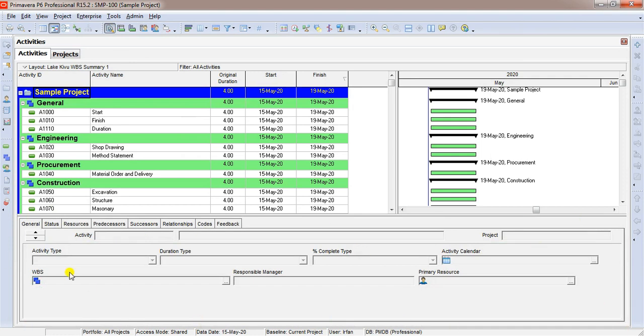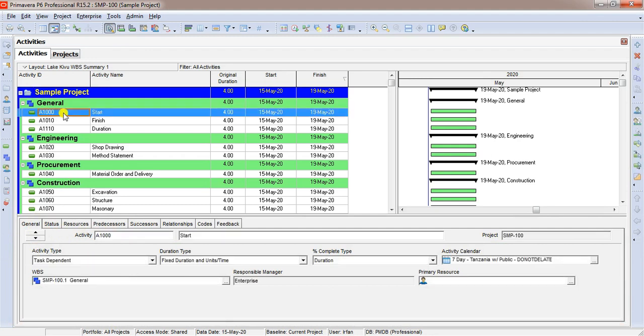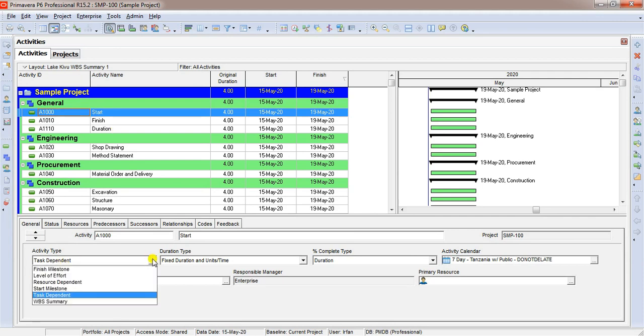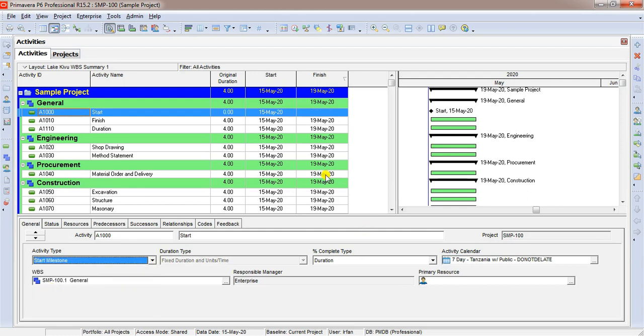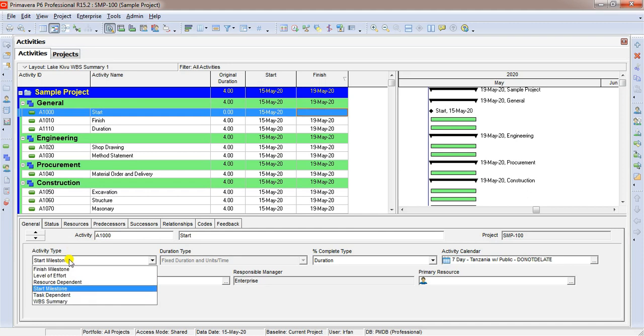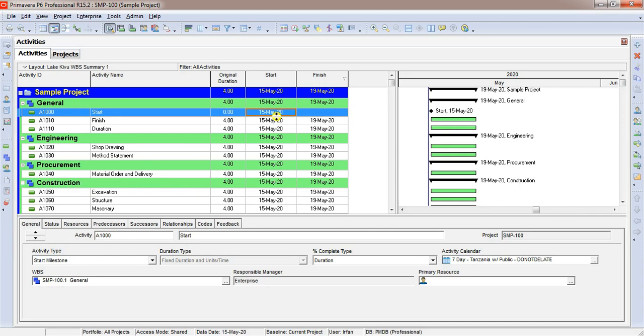You see this window. This is called activity details. Under the activity details, there are several sections. We are going to talk about activity type. Select start activity. We are considering this activity here as a project start. And as we know, start milestone has zero duration and only start date. Let us click on drop down button and select start milestone. If you see original duration, it was four and now it's zero. It was having a start date and finish date, but since we selected this activity as milestone, it has only start date. This is how it behaves in Primavera.